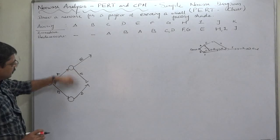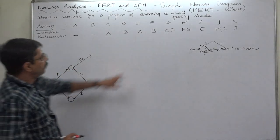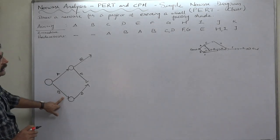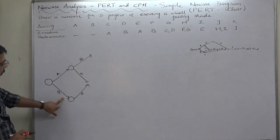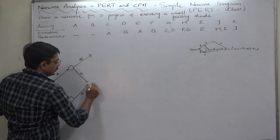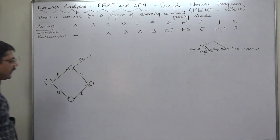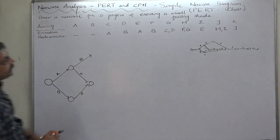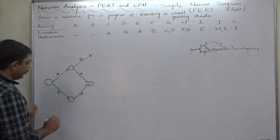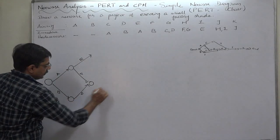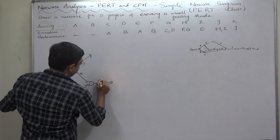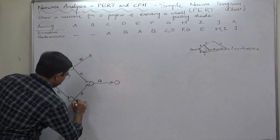Now it is turn of F. F also starts only after end of B, but this F and the next G both are going to be the common predecessors of H. So we need to merge them in the next stage. If this is G, it will be like this—F.